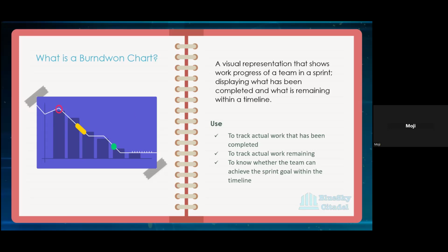So let's assume we have 2 weeks, and by the middle of the sprint we've not done much. When we see the components, you'll see it gives you a percentage of what has been done. So by the time we're in the middle of the sprint, it's showing you 2%. As a Scrum Master, you're able to use that to motivate the team: we're 1 week gone, 5 days gone into this sprint, and we've just done 2%. You look at the number of people you have in your team and ask, team, what is going on? Is anybody having a blocker? Is there any impediment that is not making the work move? Because there definitely has to be a reason why the work is not going down the way it should.